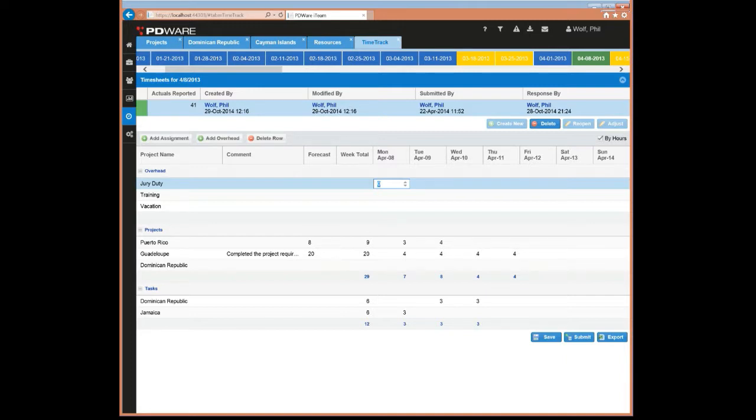So now the time tracking is happening based on what you have defined as your fiscal weeks in the system. If your fiscal week starts on a Sunday, then the time tracking will start on a Sunday. And if your fiscal week is 14 days, then you'll have 14 days to track time. So it's no longer bound by having to be just one week. It depends on the length and definition of your fiscal weeks in the system.